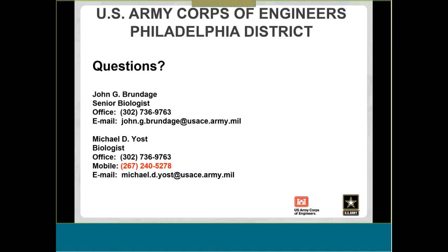Okay. What's the longest time frame you've ever had for a permit, just out of curiosity? Let's see. A couple years. But that's an individual permit, not a nationwide permit. Nationwide permits, I think the longest may have been like 6 to 8 months, but that was due to consultations and endangered species issues or historic agricultural affairs issues. So working that stuff out, but.